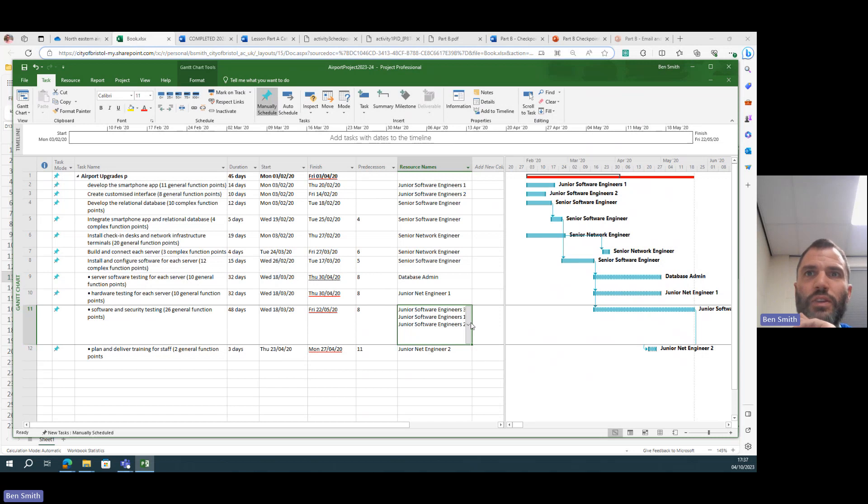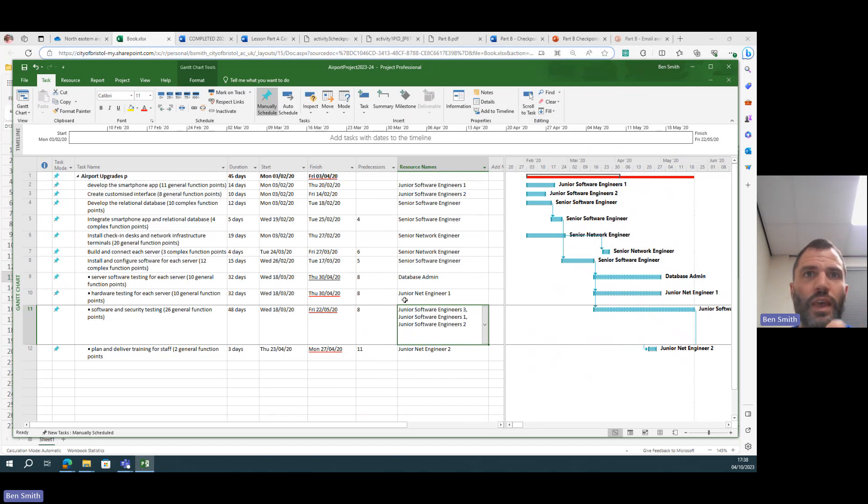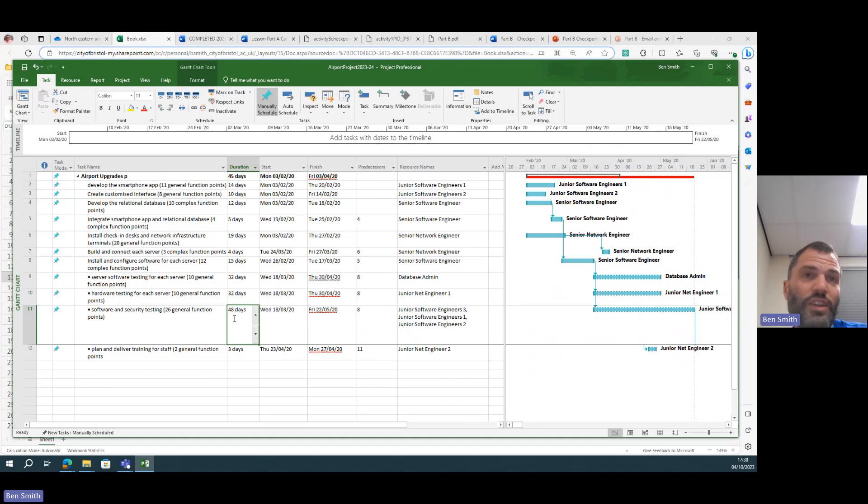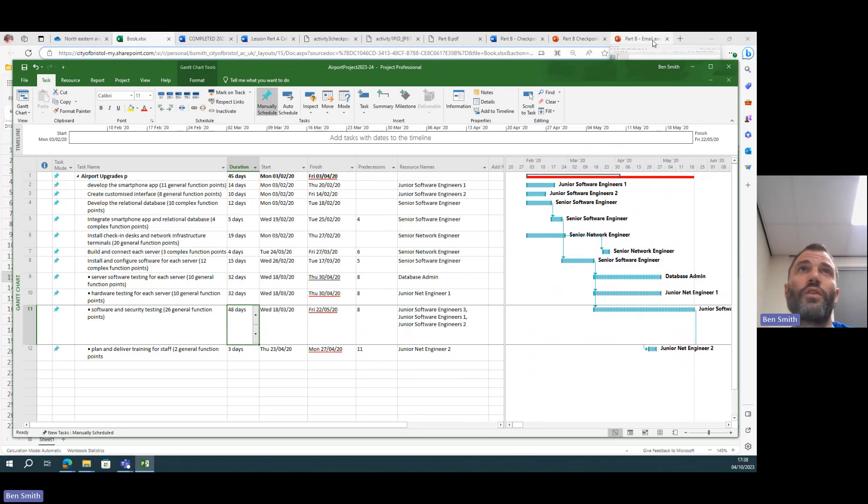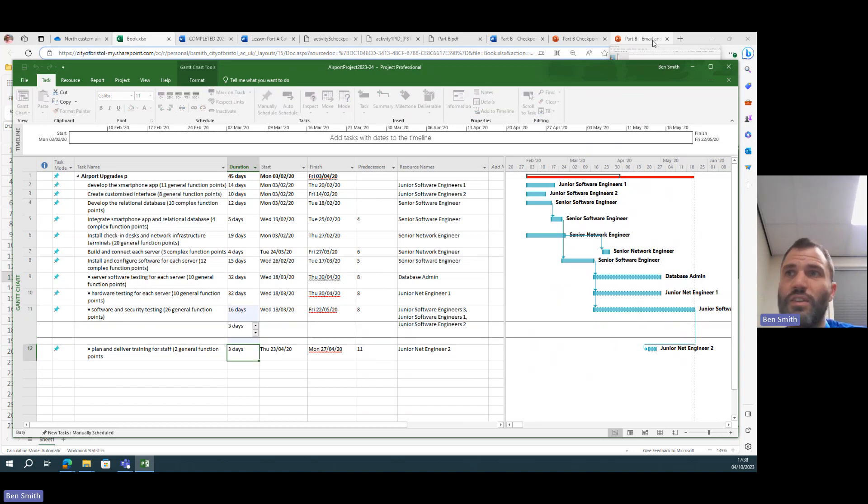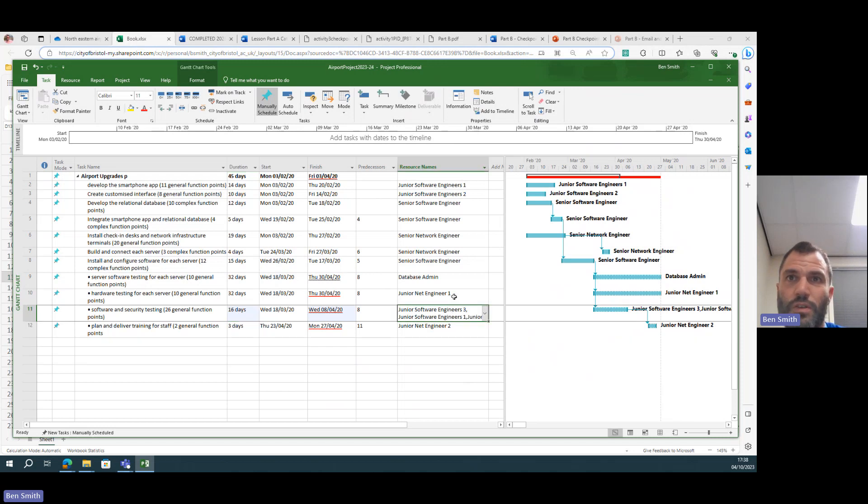So I'm going to need to put the other junior engineers on there like this. And then that means I've got, I'm utilizing more of my resources, so as long as they're not working on another task. And that means I can cut that down, essentially divide that by three. So 48 divided by three is about 16 days.